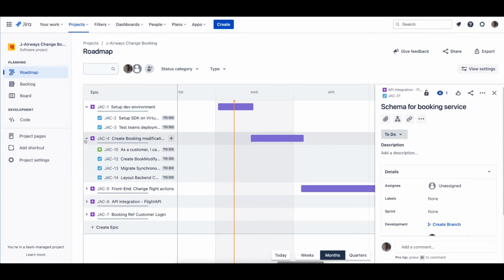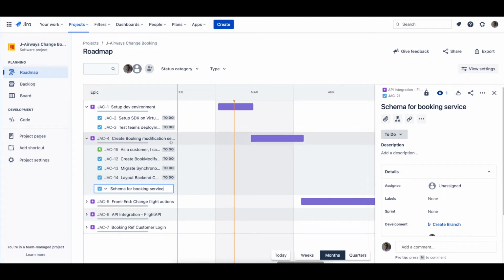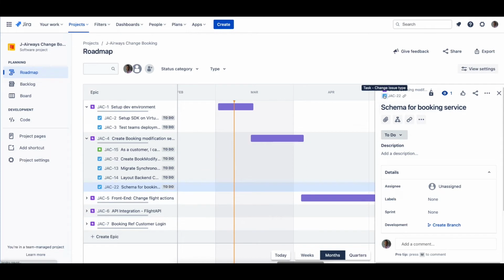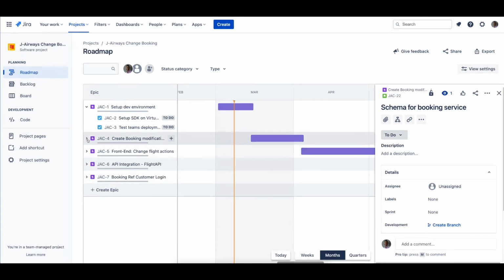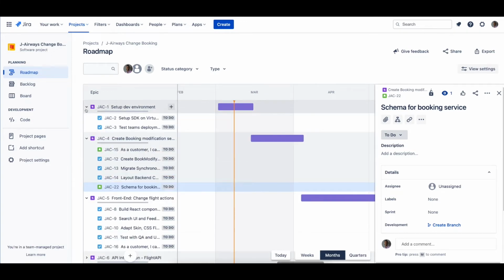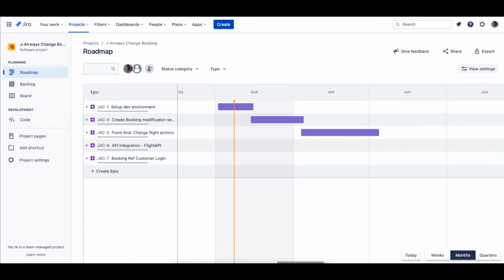Once created, you can expand or collapse the epic to see issues one level below. This allows teams working in Kanban to show story-level issues, providing a view of the scope of work required and high-level progress of an epic. This way, you can keep things high-level for an update on priorities, but if the team needs to quickly see the issues at a glance, they can easily expand the epic to see the overall planned items for that piece of work.